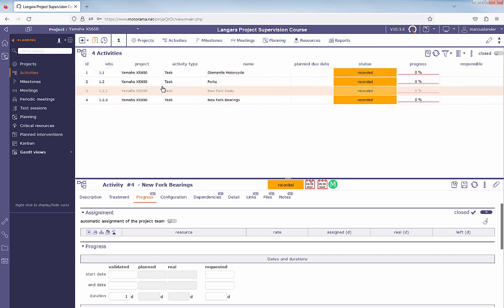So we can move these columns around just like in Excel, which is pretty powerful for a web application. So you see that we have, this is the project number, I believe, 1. This is the activity number. So this is activity number 2. These are still part of activity number 2, so they get a 0.1. So that's how the work breakdown structure codes work. And those are automatically assigned by where these tasks lie in the order of tasks. Tasks also known as activities in this situation, as well as what we've chosen as their parent.